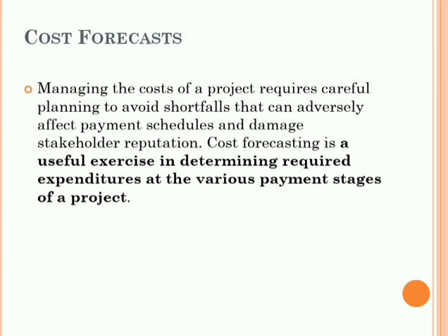The crane supplier will invoice for month 1 in month 2 and will collect payment for month 1 in month 4. This is how the actual cost is recorded. The accrual ensures that the cost of the resources consumed to date is in the books and revenue is earned correctly.